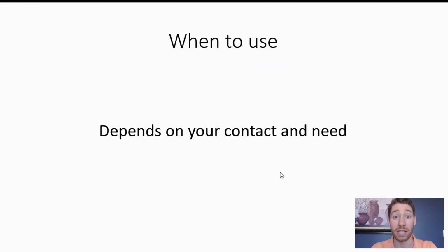That client might need a status report for an urgent meeting, in which case you would need to get that status report to them via an email. If it's something urgent, there's nothing wrong with a phone call that says, "Hey, Bob, listen, we're running into a cost problem. I'm working on fixing it, but this might delay us a week if we keep the same cost structure, or it's going to cost 5% more in order for us to crank this out. I'm working on it. I just wanted to let you know." That's a phone call.